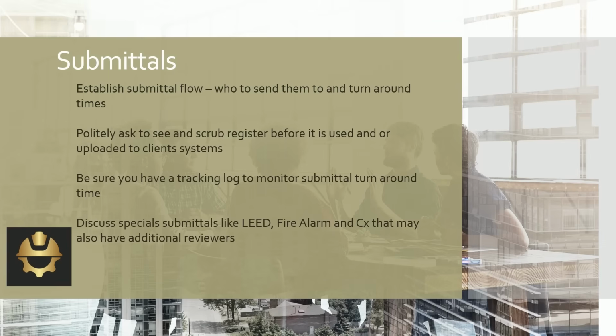Yeah, and why it's important for the MEPs is you've got long lead equipment, right? Transformers, switchgear, those sometimes, depending on how big they are, take years. You've got mechanical equipment, large air handlers, heat pumps, anything like that. This is not the world that it used to be 10 years ago. Everything takes double the amount of time, and so it really helped in that way too. And it helped the subs too, because they were able to submit what they had in their price proposal, so they weren't getting hit later on with needing additional money for different material.